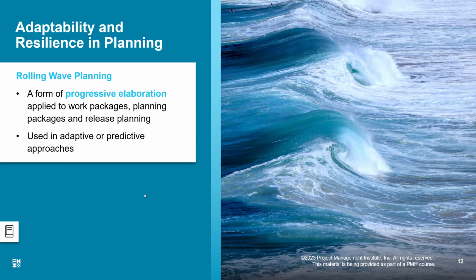But as I move to the second phase, we understand that this is very difficult to dig out. Maybe this phase is going to cost me double, because maybe we need special machinery to excavate it and things like that. There is a lot of drilling to be done. So maybe this is your progressive elaboration, which you will do at phase two. And this could be considered a project risk. Although you planned the whole tunnel, you did not understand at that point that this could occur. Now, when you're doing the project, you could have anticipated a risk which has now occurred, and now you have to deal with it. Therefore, you may have to spend extra money. You have to have reserves and contingencies available. That is how you do your predictive project management.